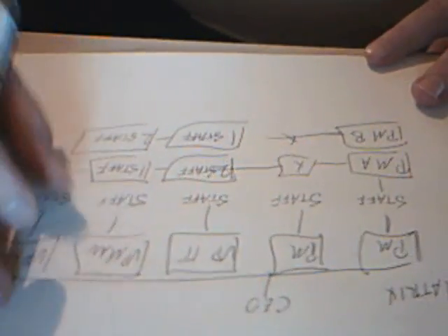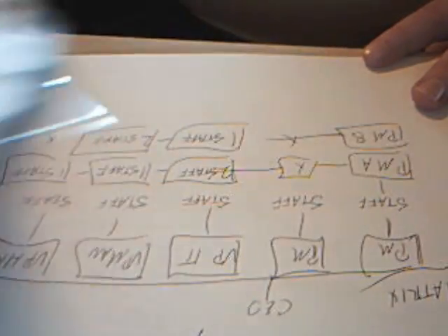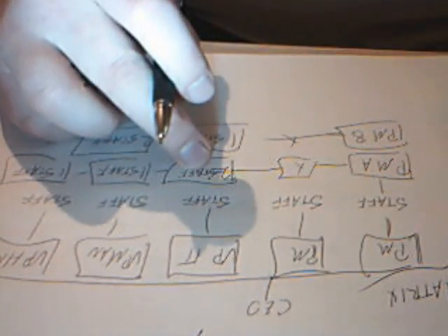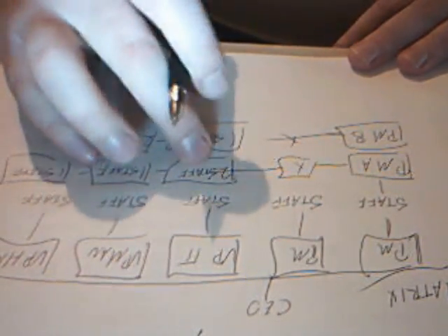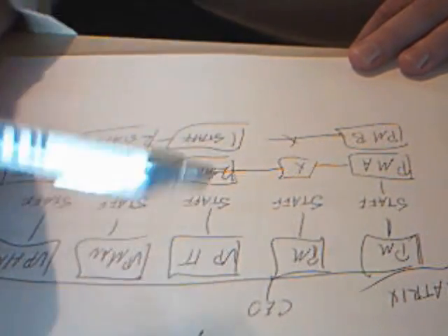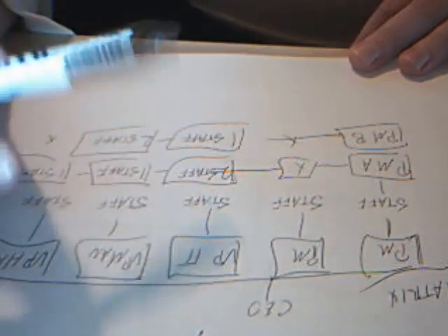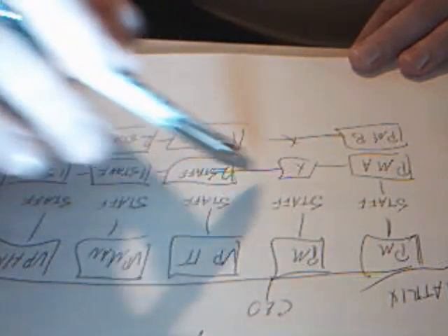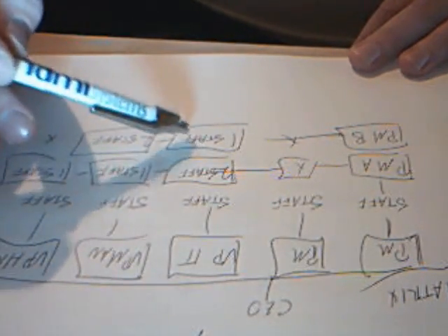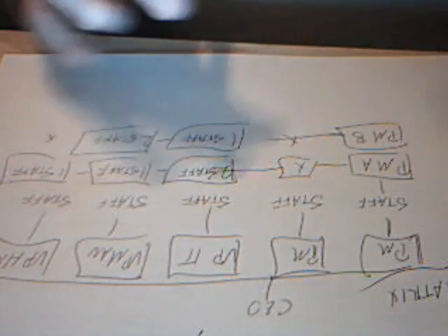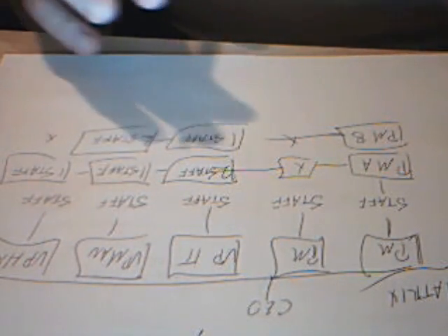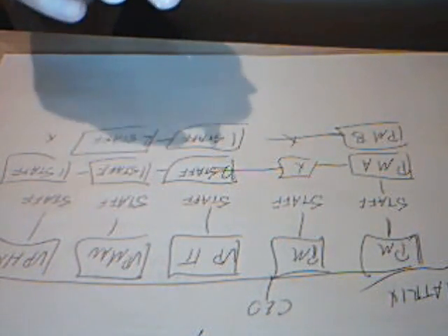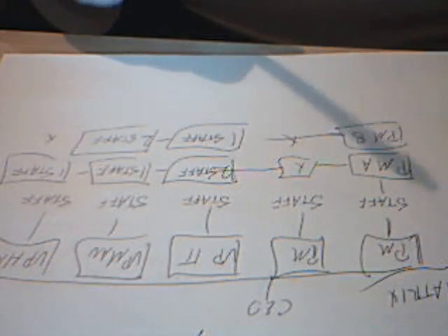So if we have the same kind of thing come here in the matrix, so that guy's working here on the project, he gets bored, or he finishes his work, we can put him right back to work in another department. So he can go back to working on IT stuff. He can work on the project when he's needed, and if he's not needed there, we've got other projects going on, he can be shifted there. So the matrix really makes great use of resources as far as staffing.